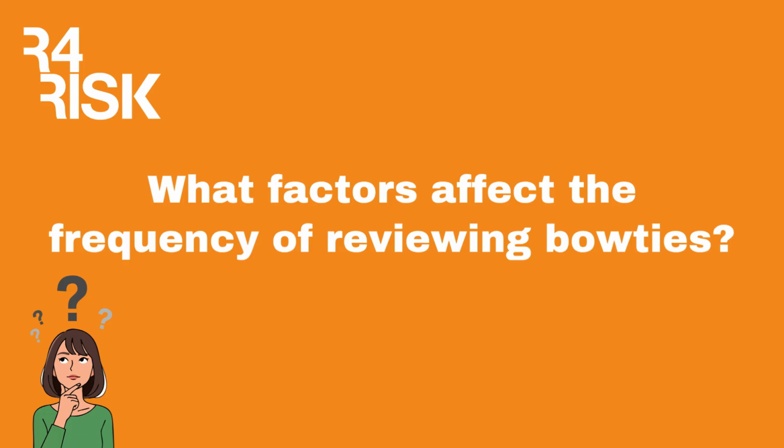Of course, any major changes to plant or controls is another great time to review specific bow ties. But normally your greatest review of your entire register will occur if you're doing a safety case, which is usually every 5 years.